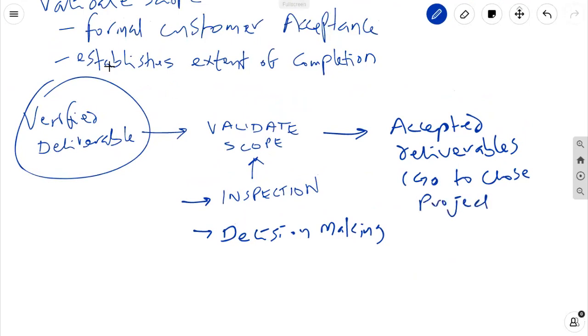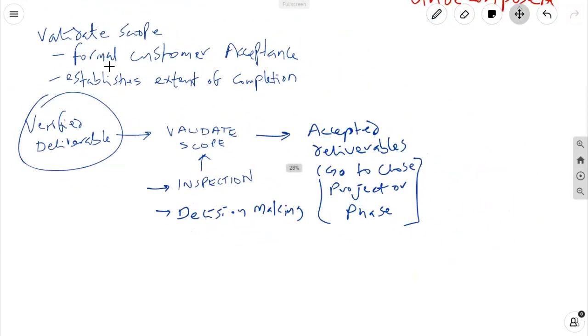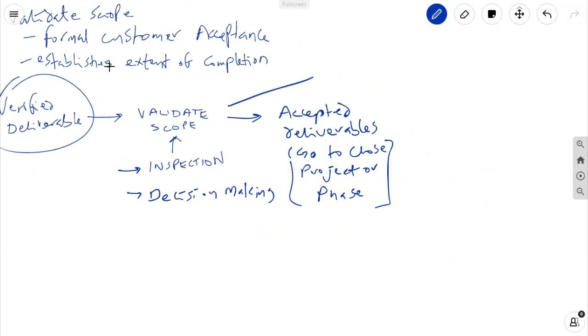Change requests. These change requests may be generated from the Validate Scope process as a result of deliverable rejection due to needed defect repair, or corrective action and process for acceptance or rejection through the Perform Integrated Change Control process.